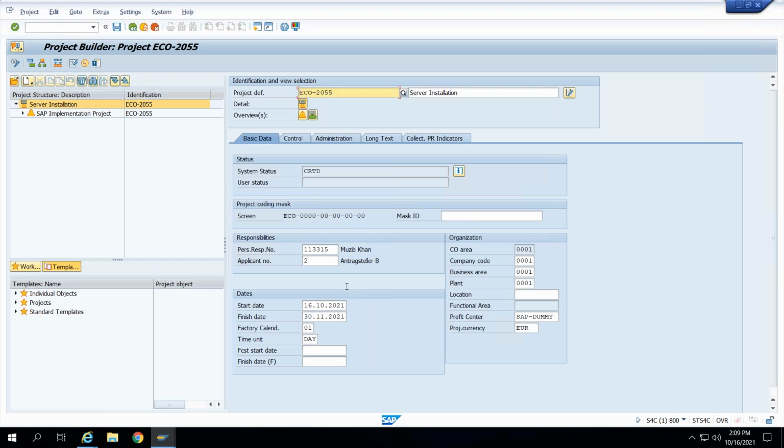So ACL, access control list, is the way where we can control authorization at the next level. The PFCG role, whatever is provided, is one thing. But on top of that, if you want to restrict your project data from others, even if they have similar roles like you, you can use the ACL. You need to activate that ACL in project system and project profile, and you will get one more tab here, ACL. There you can restrict other users to see, write or display, or provide authorization as an admin.